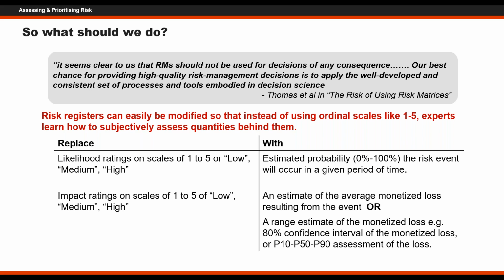And then after not much longer, you find that the expert can normally pull a reasonable range out, say it's going to be between, say, 100 and 150 million. So with these things, you don't need to go to the vendors and work up studies to get these estimates. These are experience. You're getting subjective assessments from experts or knowledgeable people.